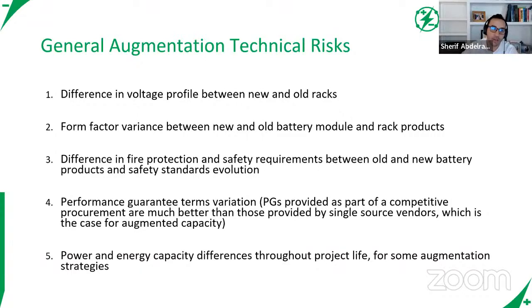You're going to go out in 5 years, you're going to get a contract with another battery integrator, or procure the batteries yourself and have an EPC install them for you. You're taking that risk on your own. There aren't many parties out there, at least bankable, that will tell you, oh yep, year 15, we're going to be there and we're going to be adding these batteries. You're not going to find that. So be prepared to take that risk on your own.